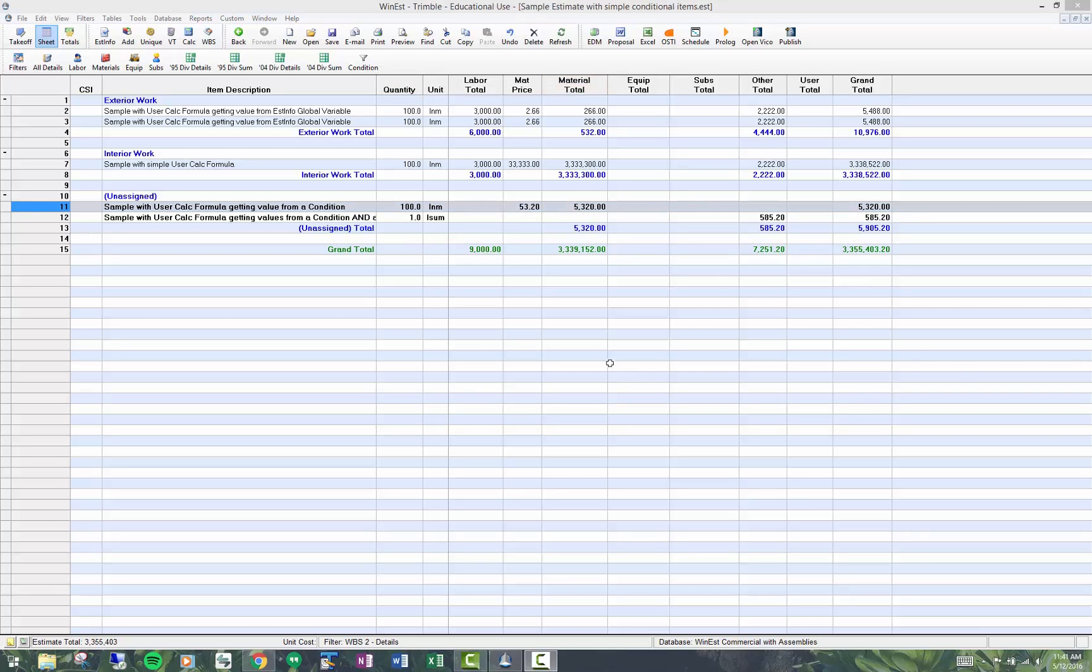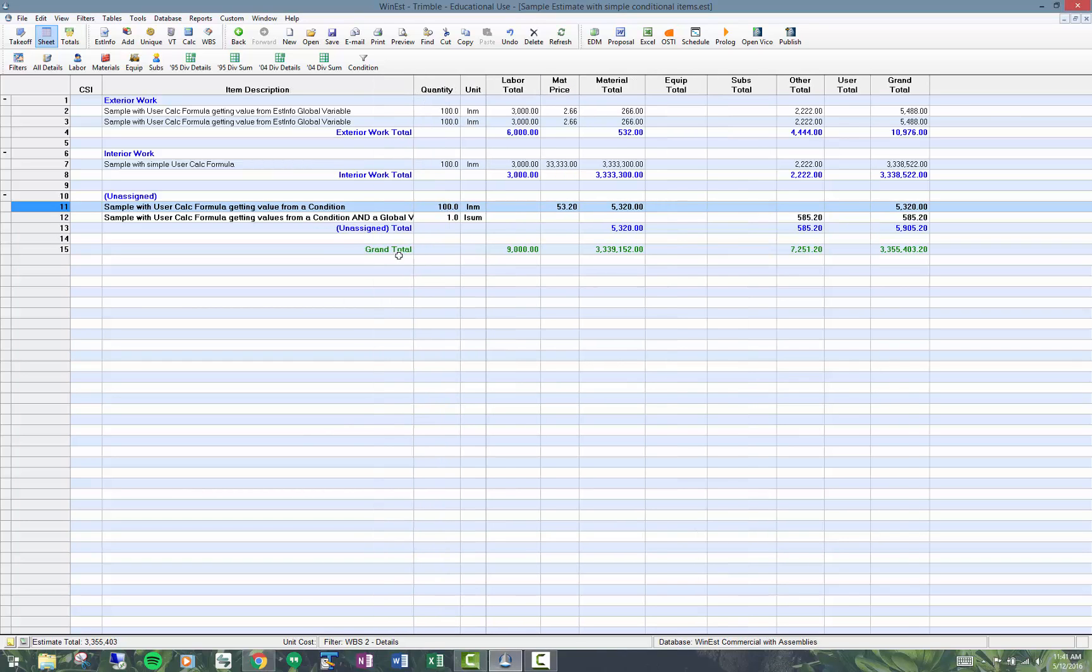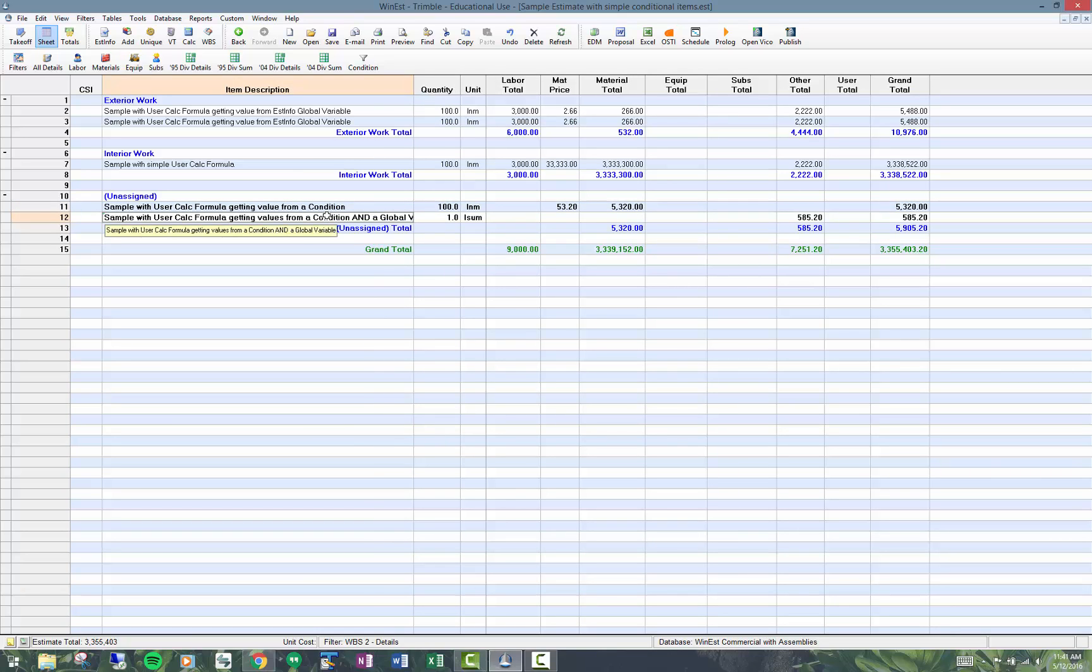The second item I'm going to show you is a conditional item that's getting a value from a condition, so it's a copy of this. Plus I'm getting an input from a global variable. I could have put that 10% in a global variable and got that value from there instead of hard coding numbers.